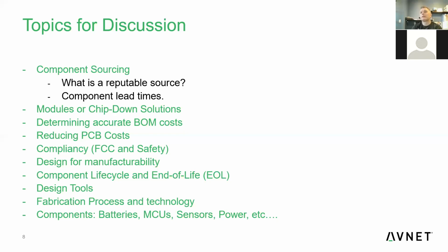Yeah. So what comes out? It was slipping my mind. Joel just asked, are there any notifications from manufacturers that a part will be discontinued in the future? And yes, there is. It's how they get to you that's the problem. They do tend to post them on their websites. They also notify all the franchise distributors. So there's an official process that a manufacturer goes through when they end the life of a product.